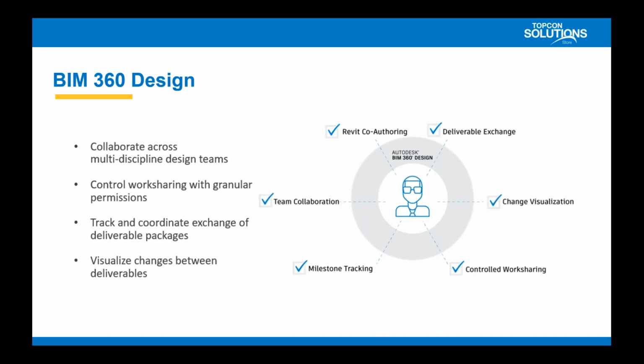I feel like this is where that construction team can step in and help set those expectations of, okay, this is when we want to do handover. When we get to this point, that's when we want to take the model. That way we can get a head start on this. We can jump from here to here, and we're not going to have this time of rework, right? But again, it also gets down to communication.